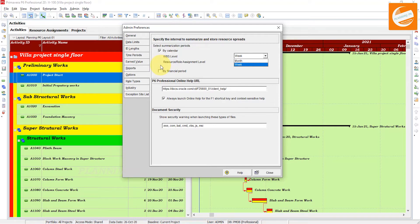In the WBS level field, choose the time interval such as week or month for storing summarized activity data. I will prepare a separate tutorial on summarization as it is a very important topic. For the role and resource assignment level, choose the time interval such as week or month for storing summarized resource data.